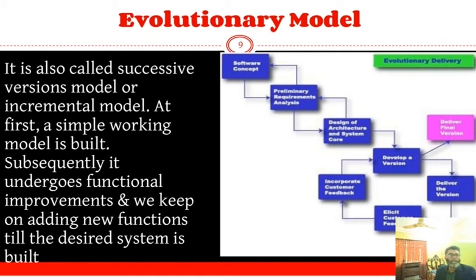It suggests breaking down of work into smaller chunks, prioritizing them, and then delivering those chunks to the customer one by one. The number of chunks is huge and is the number of deliveries made to the customers. The main advantage is that the customer's confidence increases as he constantly gets quantifiable goods or services from the beginning of the project to verify and validate his requirements. The model allows for changing requirements as well as all work is broken down into maintainable work chunks.